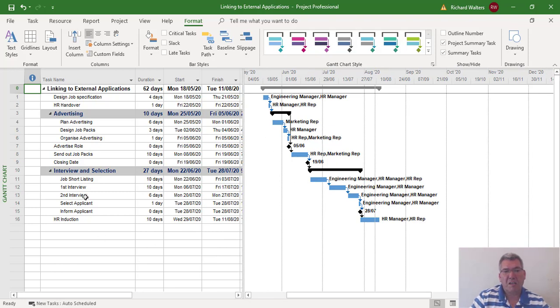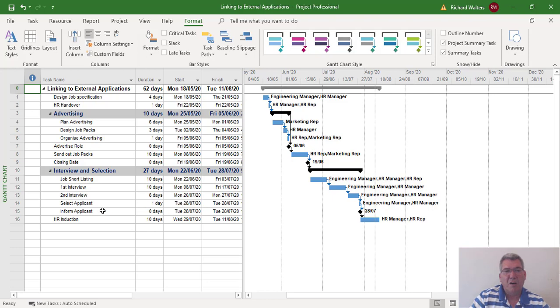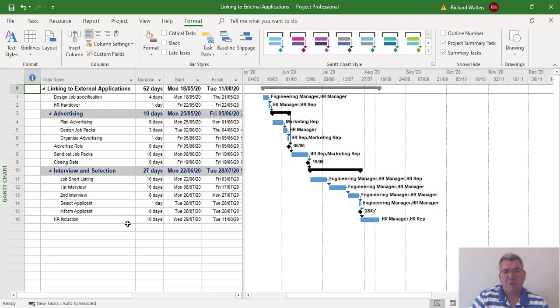Let's say for example, first and second interview and select applicant is directly after on the Tuesday. After the first and second interviews, they decide they want a break before they select an applicant. They want time to review things or do other work, not do it the very next day.